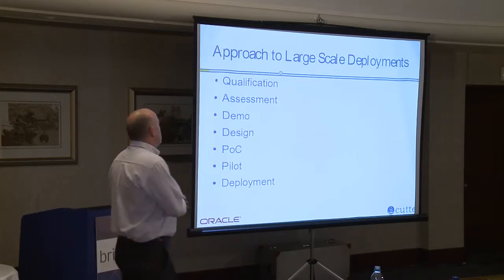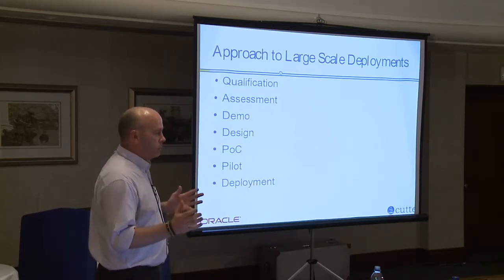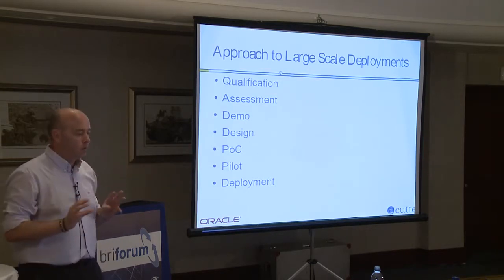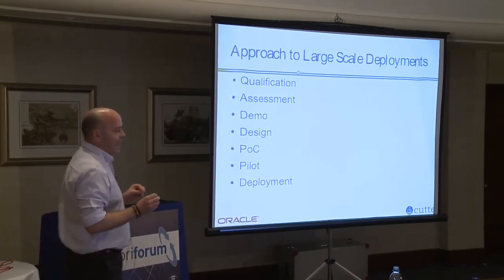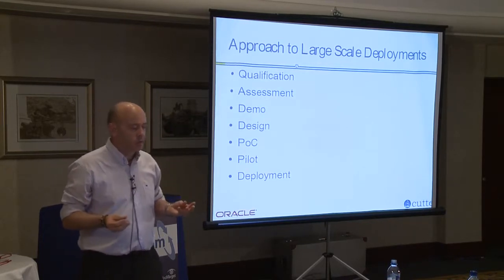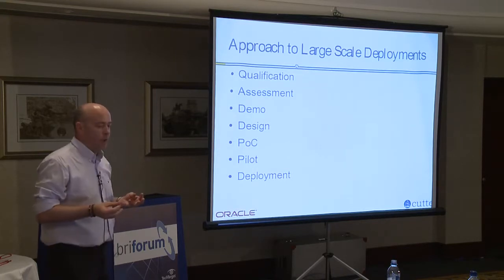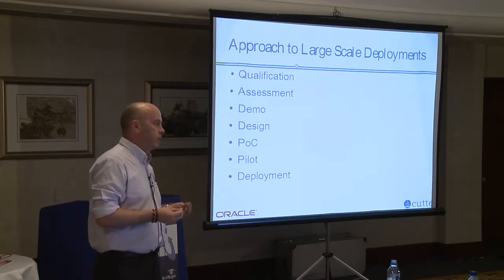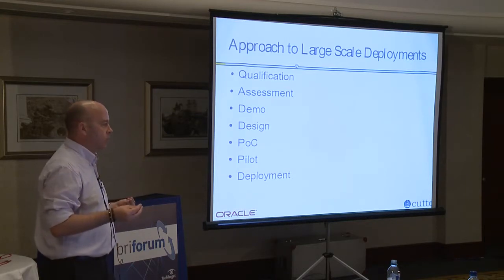We're going to have a look at the approach to large-scale deployments. The last 2 years, we've seen so many failed VDI deployments, and there's an awful lot out in the press about failed VDI deployments. A lot of it we're finding is people getting hooked up and focused on single points of the technology that's available out there. This is an exercise in expectation management. Successful VDI deployments are infrastructure projects, but they are expectation management projects, and you'll see that as a theme throughout all of this. 70% of the work that we do with a customer will be around expectation management, because if you get that bit right, you will understand how far this technology will fit into that organisation, therefore you will have a successful deployment.